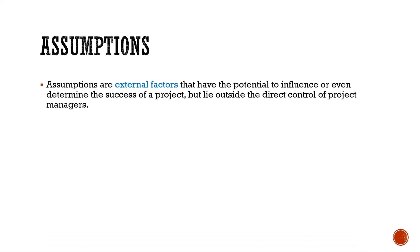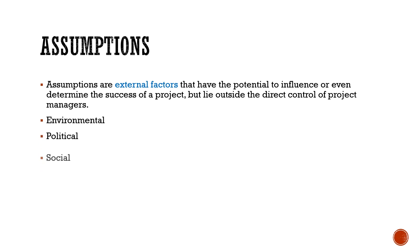Finally, there are the assumptions. The assumptions are the external factors — external risk factors that have the potential to influence or even determine the success of a project. You can write them down in the assumptions column. The external factors relate to environmental factors, political factors, social factors, technical factors, and economical factors.